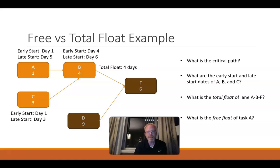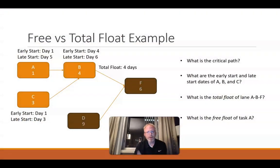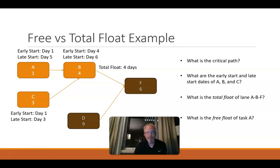What's the free float of task A? This is where things get interesting. Free float means how long can this task be delayed before it impacts the early start date of the subsequent activity. First, let's think about the free float of C. Free float of C is effectively zero, because if C gets delayed at all, task B cannot start on day four. But what about A? A is only one day and it's running parallel with C, which is three days.